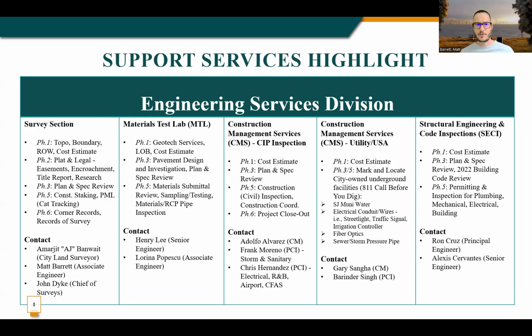And a quick note about plan and spec review, not just for the survey section, but for all of the engineering services sections. Even if you're working on a project that you don't expect to include engineering services support on, if you're doing a consultant design project and the contractor is going to be responsible for surveying or other services, it's still a good practice to send your plans and specs through our sections for review when you're in design. We're all the subject matter experts on these different topics, so it's good for us to be able to review and provide comment back and help catch issues before things move into construction.